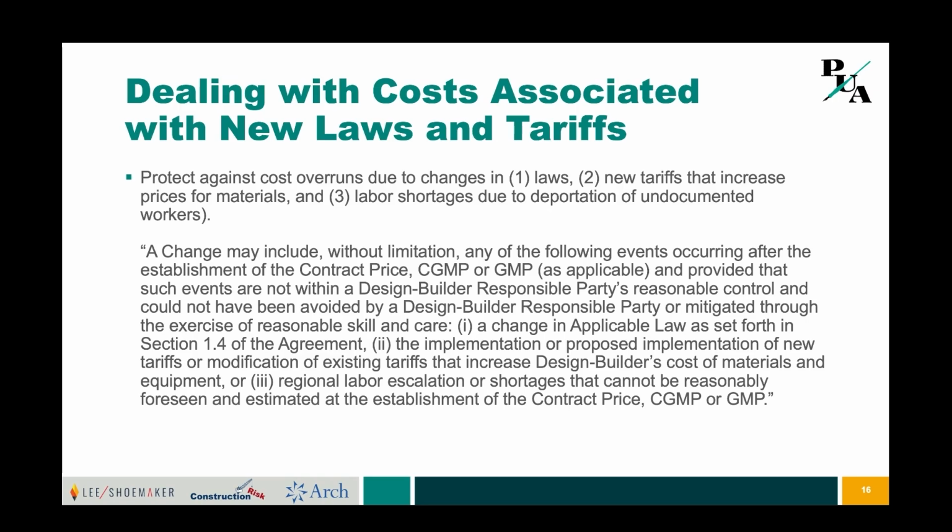the base scope of services design to budget obligations and value engineering at the completion of construction documents. A highly inefficient time for you to be going back and revisiting design decisions. And what I would suggest is, especially in a world where there's uncertainty on pricing, the later into design you're making changes because of fluctuating material prices or labor prices, the bigger risk the owner is shifting over to you. So in addition to what Kent's talking about, I think it's also important to be cognizant of design to budget obligations and value engineering provisions included as part of your base scope of services and trying to qualify those types of terms as well.